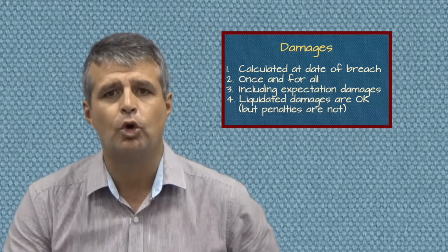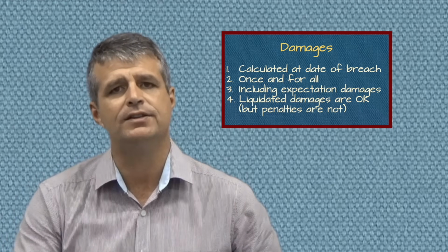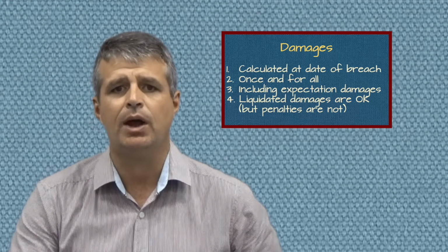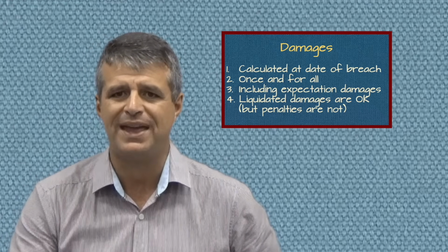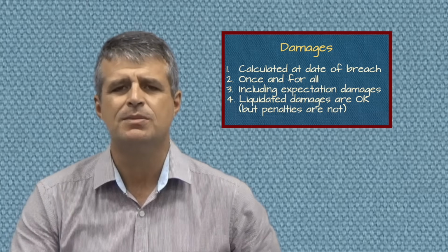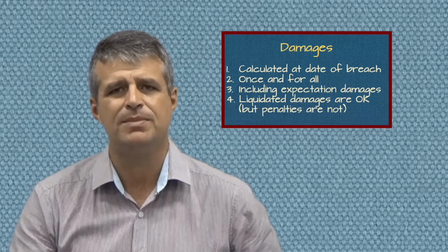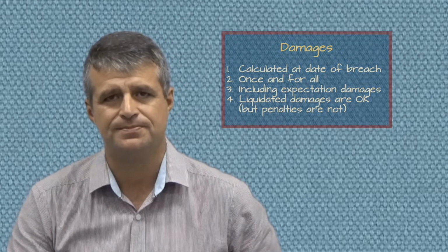The only time that the court won't enforce that liquidated damages clause is if it's so outrageous that it becomes what we call a penalty. So it functions more as a punishment than merely as a form of compensation.